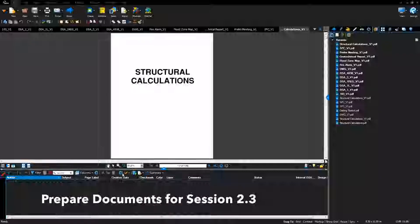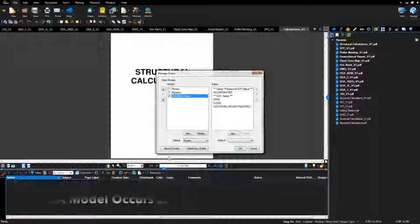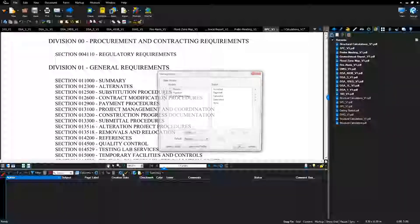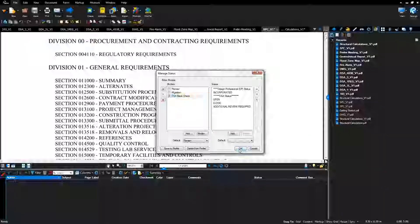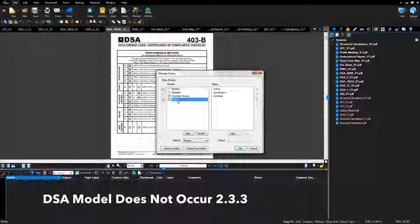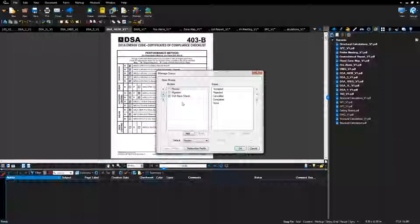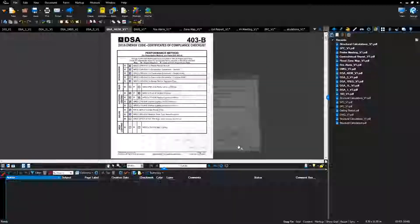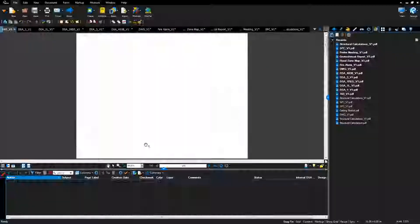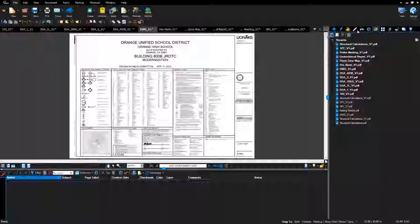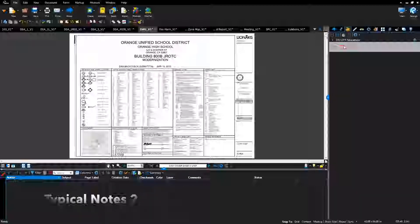Prepare documents for session: select the manage status gear at the top of the markup list. Confirm that the DSA back check menu is listed for all documents. If a foreign model exists, select the foreign model and click the red X to delete, then click OK. Select the manage status gear again, confirm the DSA back check menu, and click OK. Complete these steps on all PDF files submitted. Once the back check menu has been confirmed, save and close PDF files. Add typical notes to the DWG v1 file — on the cover page, put the void application note and the notice to the design professional note.